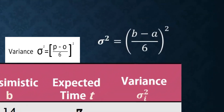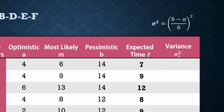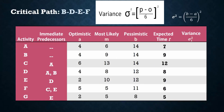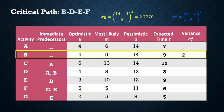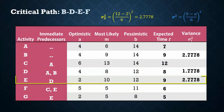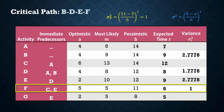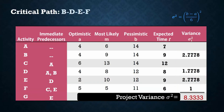The formula for calculating the variance for each activity is B minus A divided by 6, squared. Just like the project completion time can be found by adding up the expected activity times for critical activities, the project variance is also found by adding up variances for critical activities. So we only need to calculate the variances for critical activities. For B, the variance is 2.78. For D, it is 1.78. For E, 2.78. And for F, the variance is 1. Adding these, we have the project variance of 8.33.